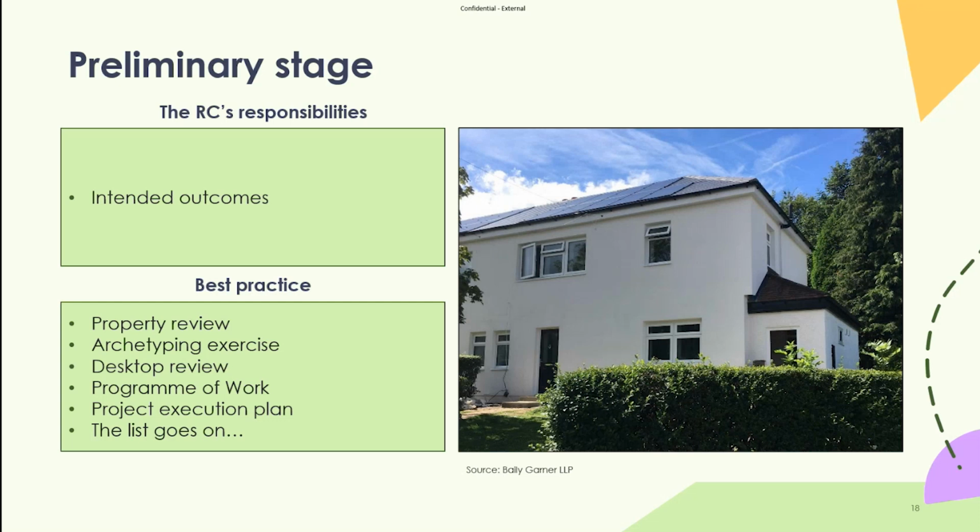And to give you an example, I'm working on a project where we are treating an estate of non-traditional properties. So we've got the benefit that they're actually quite similar building types, all of the same nature of construction. But one of the first things I did, I went around on Google Maps and I looked at the differences in actually the same property type. So had there been extensions built at the back? Were there some odd looking extensions that have been put on the side by the resident over the years?